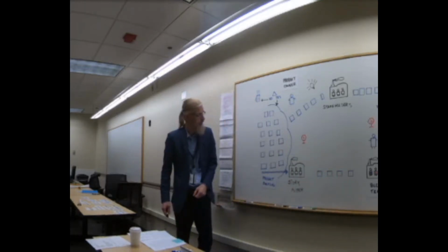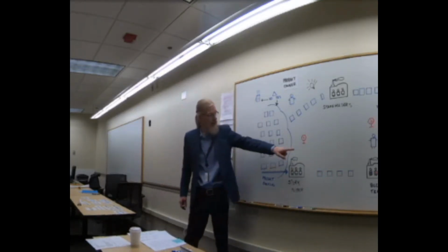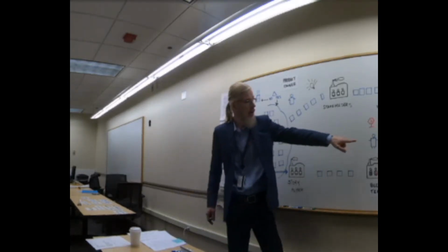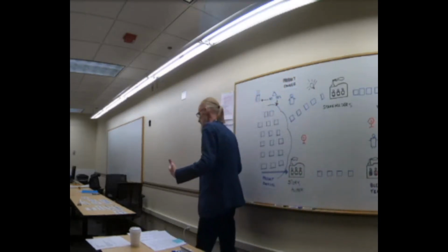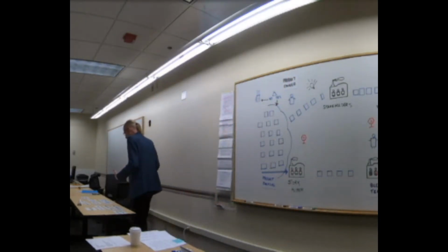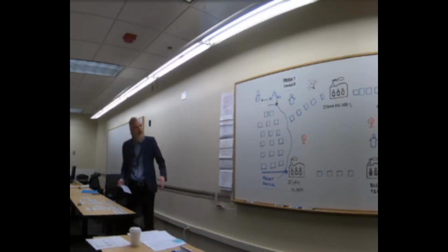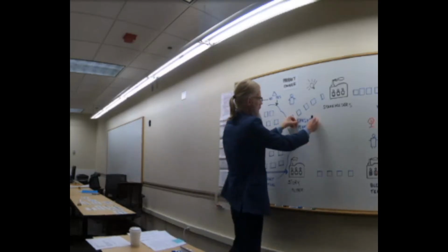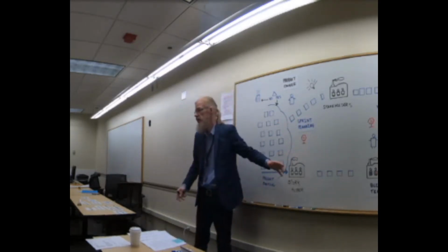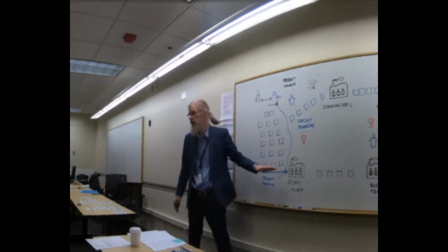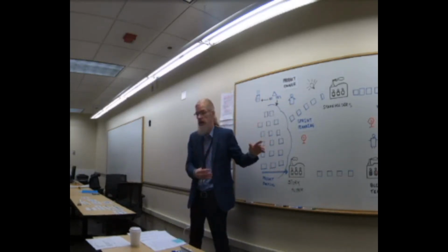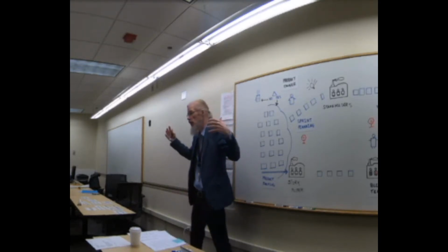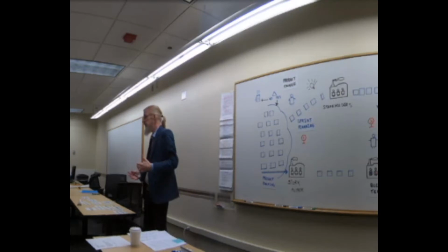team. Okay? Now, I put a stop sign here and I gave it a number 1. This is our first of the 4 events, and I will just mention it now. We'll get into it in much more detail tomorrow, but I'll mention it now because it affects our role, the product owner, and this is called the sprint planning here. I like to use a stop sign because in this flow of activities, we stop right here. We do not keep going until we've done the sprint planning meeting. Okay? Sprint planning meeting happens for every single sprint before we begin sprinting.